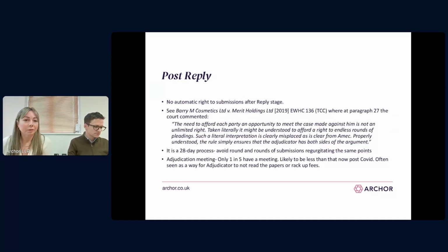So after the reply, you'll nearly always see another submission from the responding party, and then perhaps a final submission from the referring party, and sometimes more if it's a complex dispute. However, all of these submissions are at the adjudicator's discretion. There is no actual right to issue further submissions, and the quote from the Barry M case on the slide is just a reminder of that.